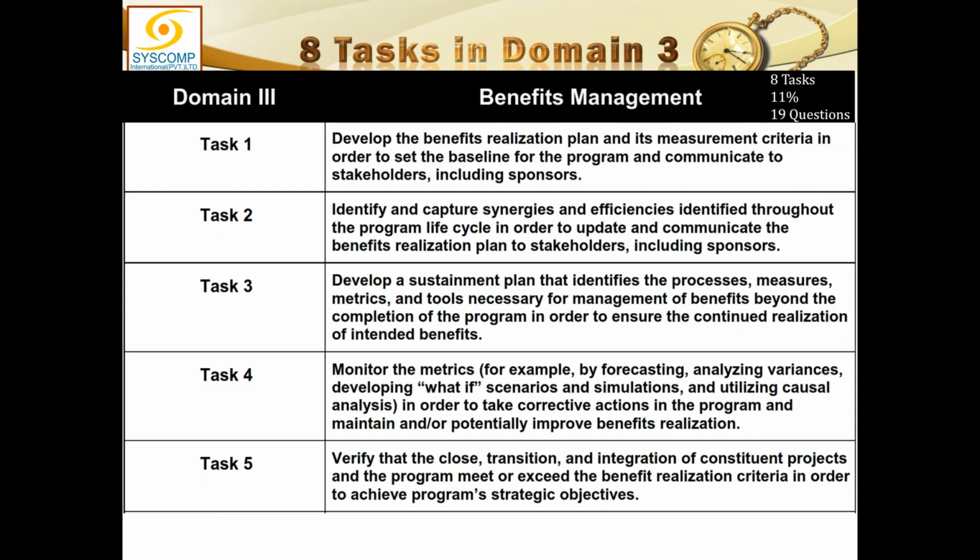And not only that, but also its measurement criteria. What benefits are to be realized when, and how would you measure them, in order to set the baseline for the program. The program baseline is the benefit realization plan. And then when it is created, it is to be communicated to the stakeholders, including sponsors, again for the purpose of seeking their buy-in. I hope you understand this point. Yes, Julian? Got it. Wonderful, wonderful.